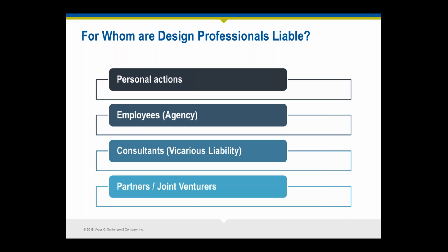when you retain consultants that you first of all make sure that they have adequate insurance in place. There's no guarantee when you hire them that they're going to have insurance in place when a claim comes in, but you at least need to ask for certificates of insurance on an annual basis to make sure they're continuing to carry the insurance. And you want to make sure they've carried it in the past, because that's often a good indication that they're going to continue to carry insurance into the future. You want to obviously investigate them to make sure that they're experienced and knowledgeable and they have a good reputation and experience with the project type and all of that, so that anything you can do to try to reduce the exposure to your vicarious liability. And we have some excellent claim studies on vicarious liability claims of retaining subconsultants, and a lot of information that we can offer to you to help evaluate subconsultants.